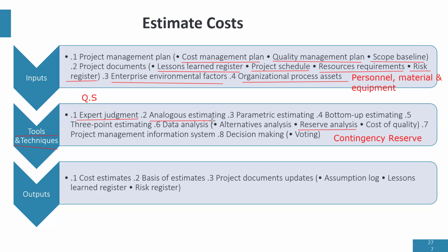So let's say that you're painting a house. You now remember the last time you painted a house with the same size in the past 6 months, it cost you 500,000. So using analogous estimate, since the area you want to paint is the same, you can just put the price tag for painting as 500,000 as well using analogous.